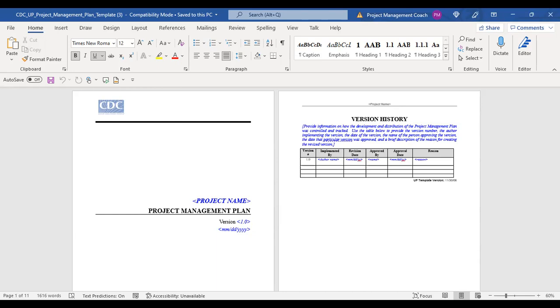An example of this is if the program management plan indicates all changes exceeding a specific cost need to be change control board reviewed, then we need to follow that process even when it comes to the smaller plans that fall under this overarching program management plan, right? We also want to define the cost thresholds in the project management plan, all right?